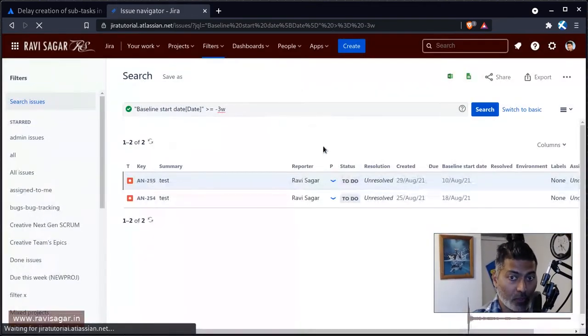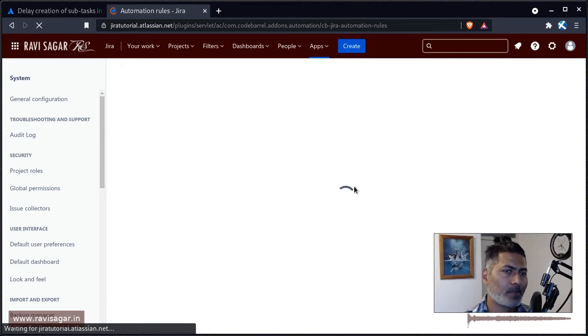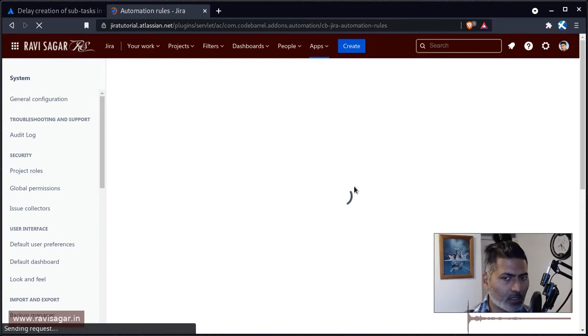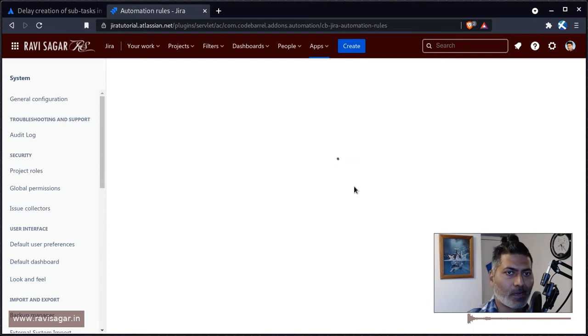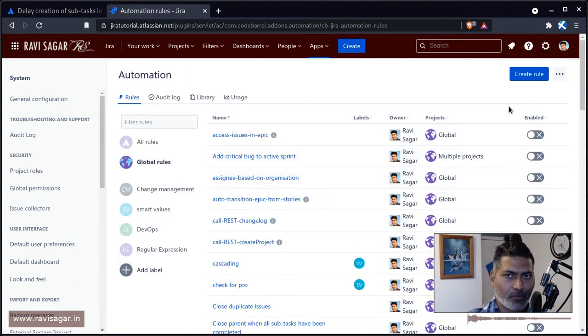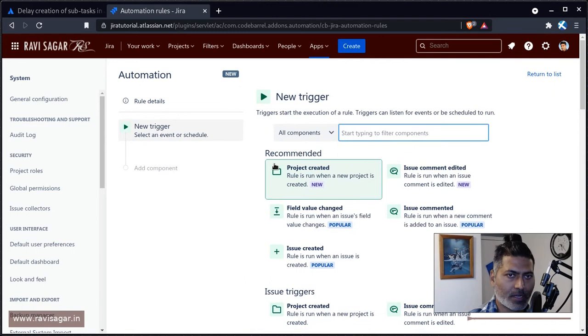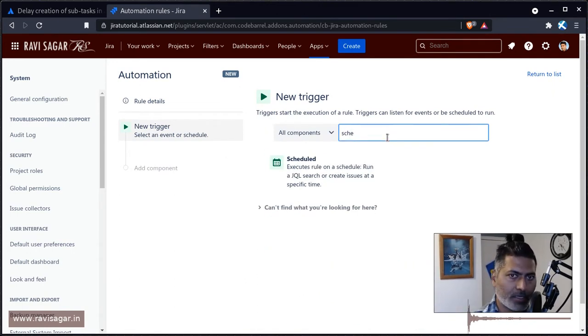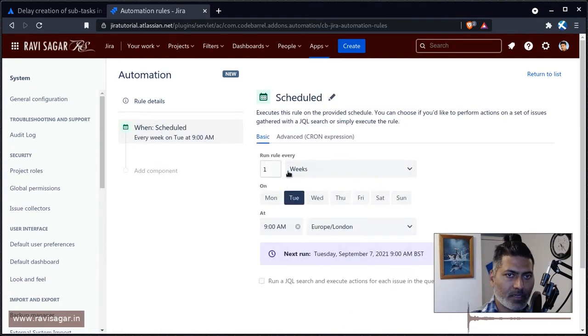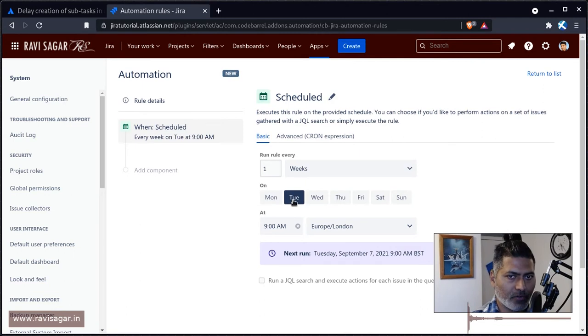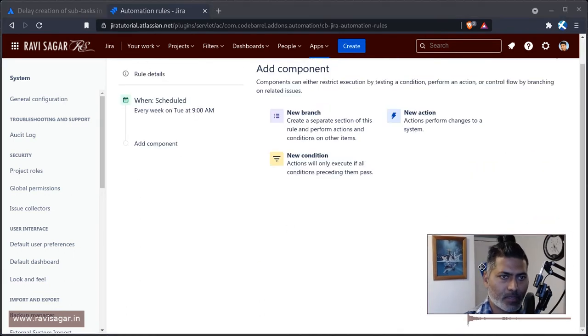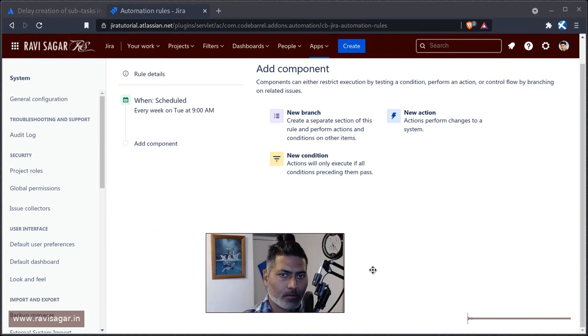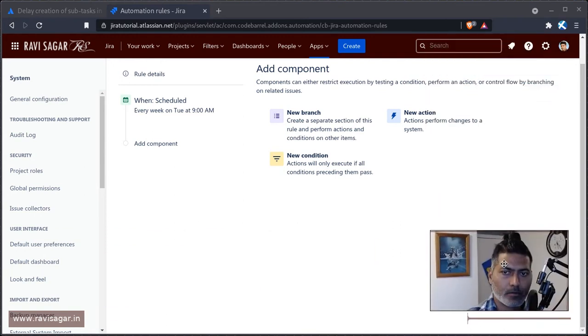Let us go back to the automation rule. What we will do is create a rule based on this. This should not be difficult to do, and I'll show you very quickly how to do it. Let us create a new rule. What I can do is use a scheduler here. You can say that you want to run it maybe every week on Monday or Tuesday, whatever you want, and save it.